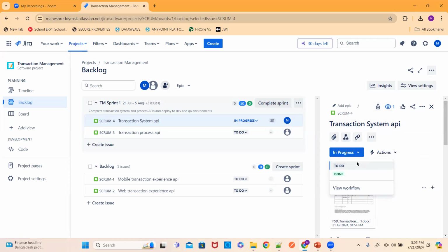See, mostly once you are assigned with a user story, you can go to that, read the entire summary and description of that particular story. And do you have the entire information to start that particular project or not? Check it out. If everything is available, then change the status from to do to in progress and then start your work.